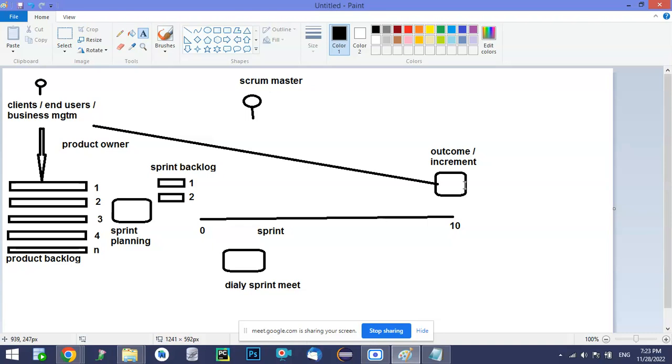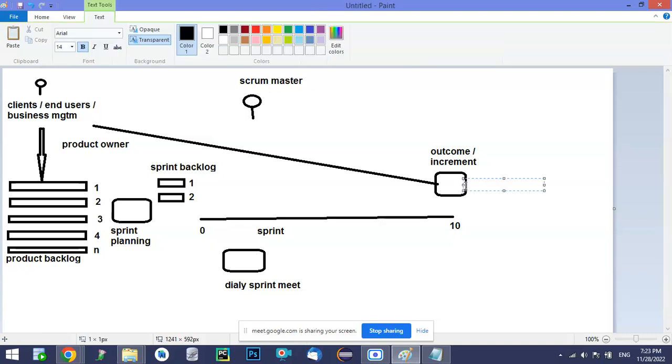After each sprint we will also have a feedback meeting, on how the sprint went, what we did good and what we did bad. Such kind of analysis we do in the retrospective meeting. So the intention is a process where we do limited requirements in a limited time, to interact more frequently and continuously with the client to get feedback, and to implement more in parallel.